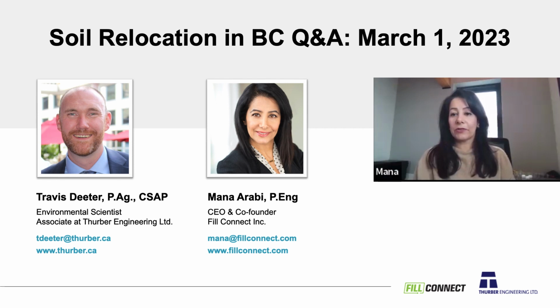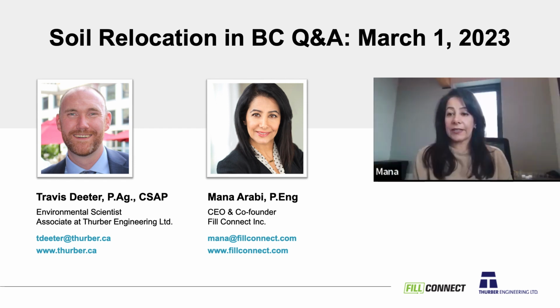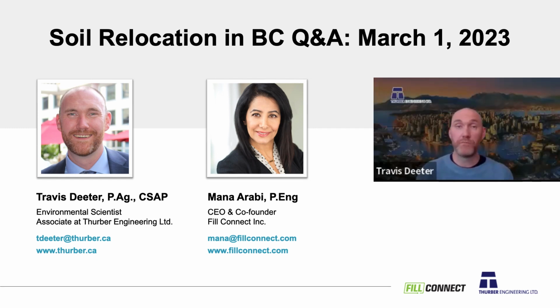So I'm just going to go through some of the questions here. One question is, can Travis speak about how to avoid the notification process? I.e., what exemptions are there? Are facilities on First Nation land exempt? This is actually a really good question because a lot of people think that First Nation land is exempt, but I'll let you go ahead. Sure. Really the only exemptions are those ones I discussed at the start. So you're either moving less than 30 cubic meters, or you're moving soil to a federal property other than a First Nations reserve. So First Nations are included in this.